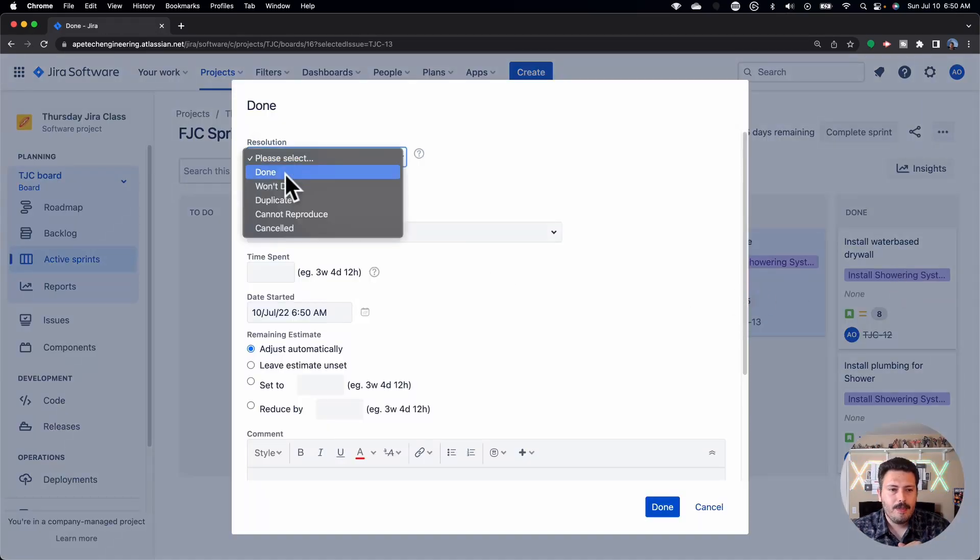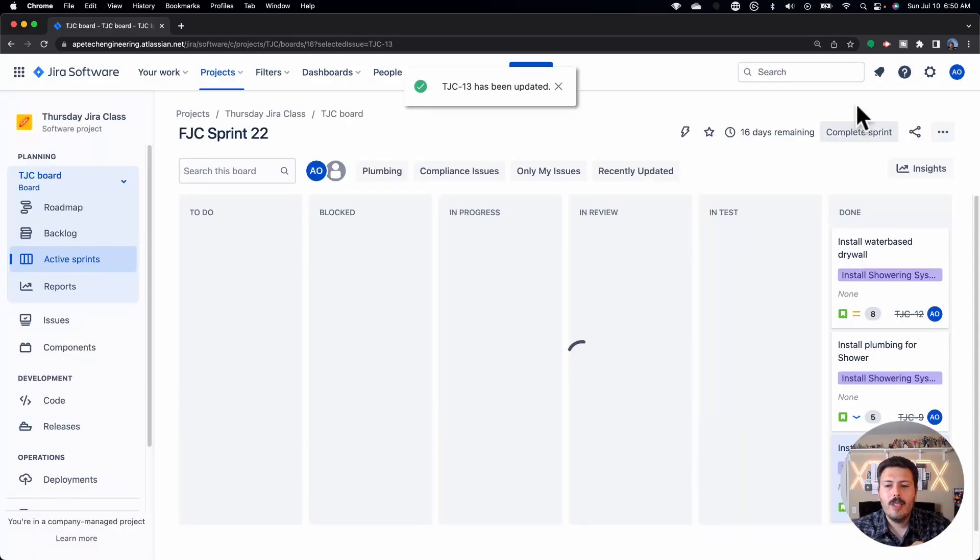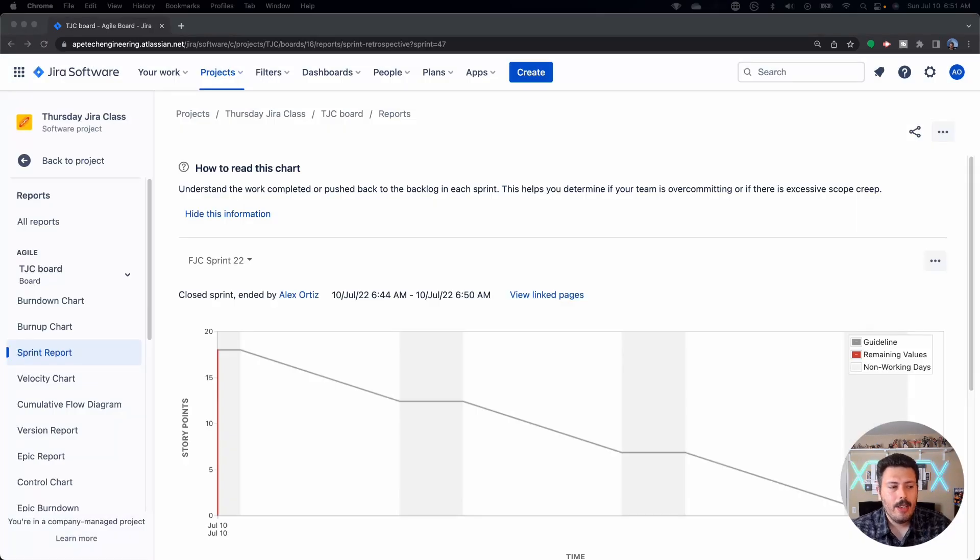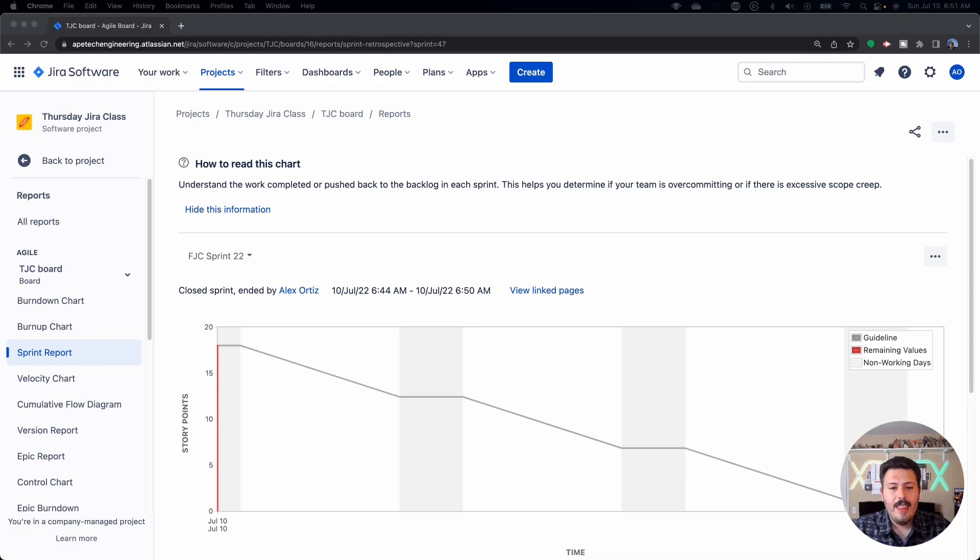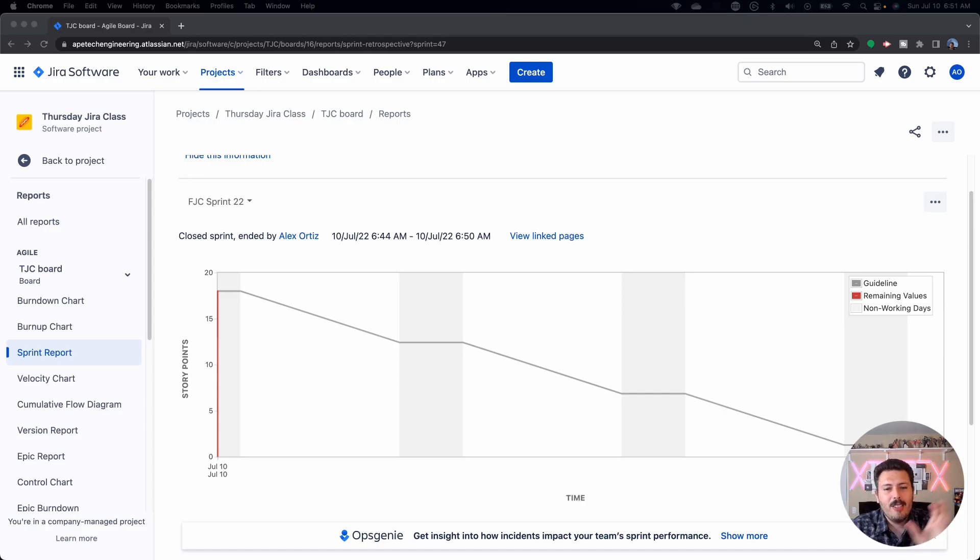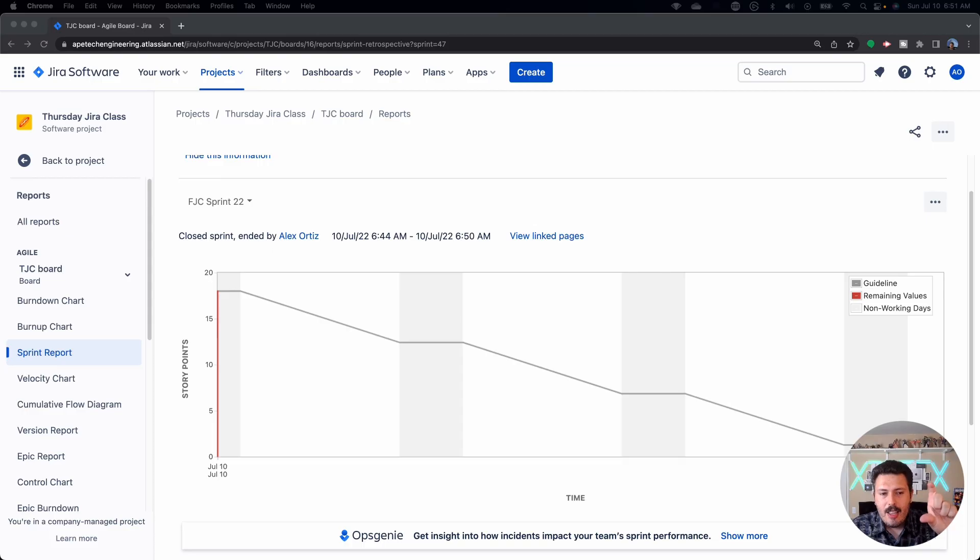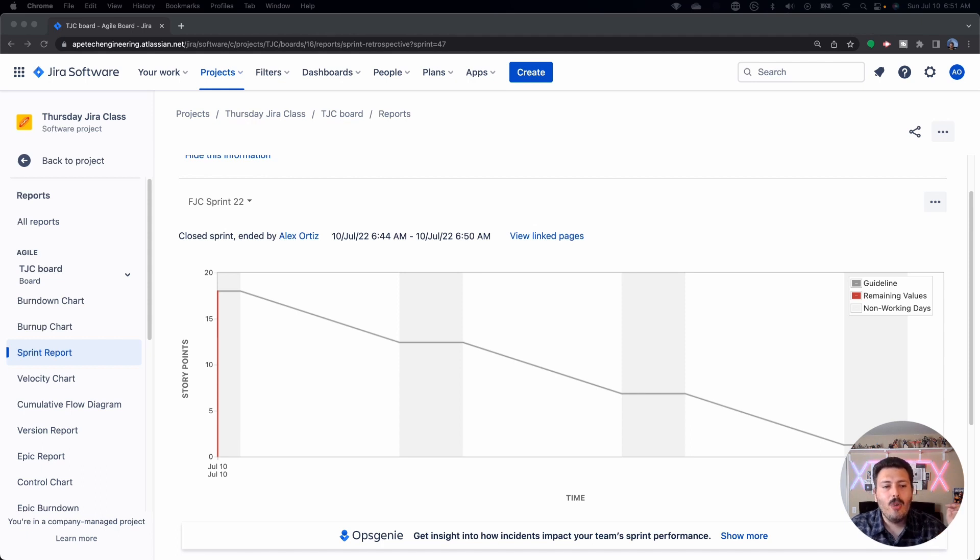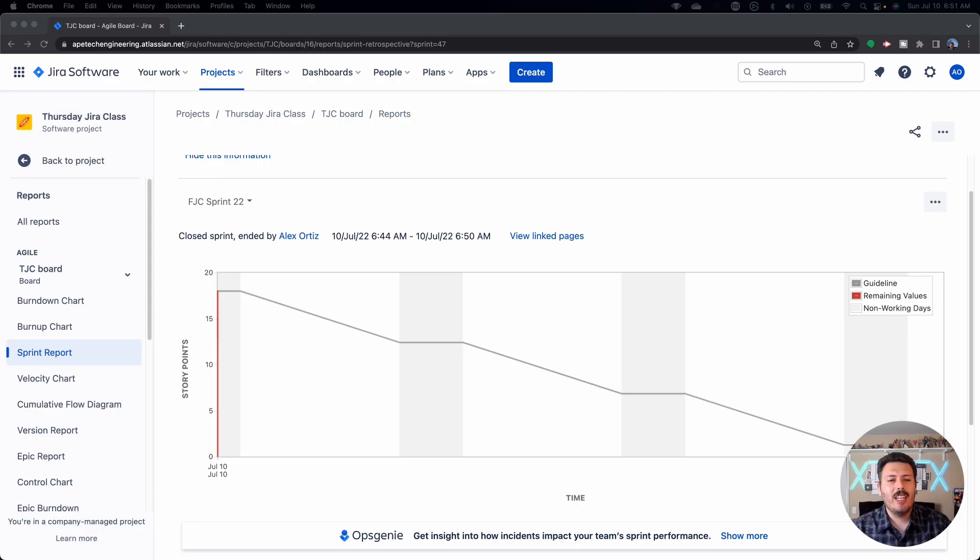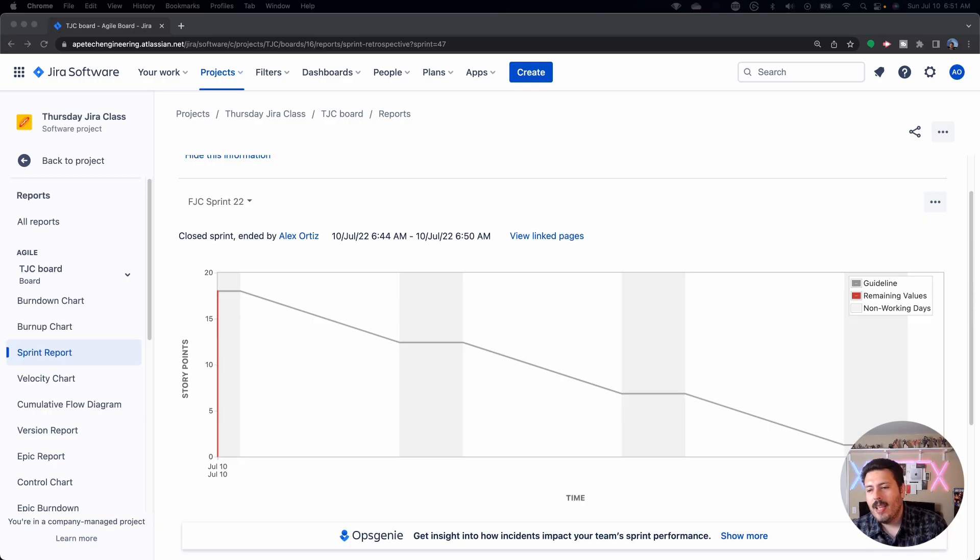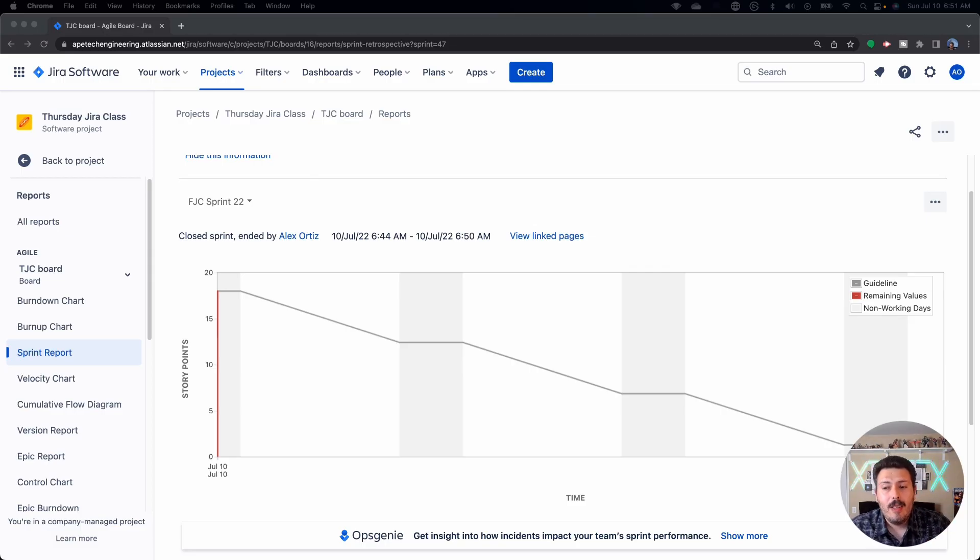This brings us into the last section here, which is once you complete your sprint. Once you complete your sprint, you are then able to essentially arrive at your sprint report or your burndown. And this is the place, this burndown is horrible because I started my sprint a few minutes ago and I just closed it. But yours should look as accurate as possible. And the intent is for this red line to essentially hug this gray line as much as possible. And so if you have a straight plateau, that's not good. If you have any spikes up in your burndown, that's generally not good. And so you want your team to essentially be working and closing things out, which again encourages those conversations between your dev team, yourself, and your product owner to kind of get things actually closed out and get the credit when it's actually done, not wait till the end. Otherwise what would happen is you have this giant plateau and then on your last day you'll have a giant cliff and you'll fall off here. You're going to have to roll that to the next sprint.